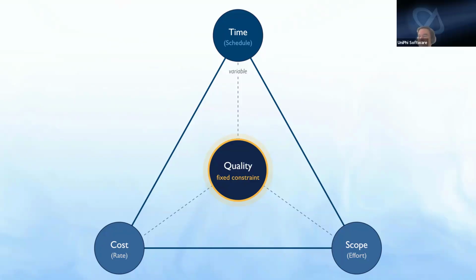A project manager has budget and scope change that they can utilize to make that happen. So you may see a reduction in the scale of these stadiums, or less quality catering to fit into budget constraints, but everyone has to be ready on that time. And that last bit in the middle is basically where you would center change control.